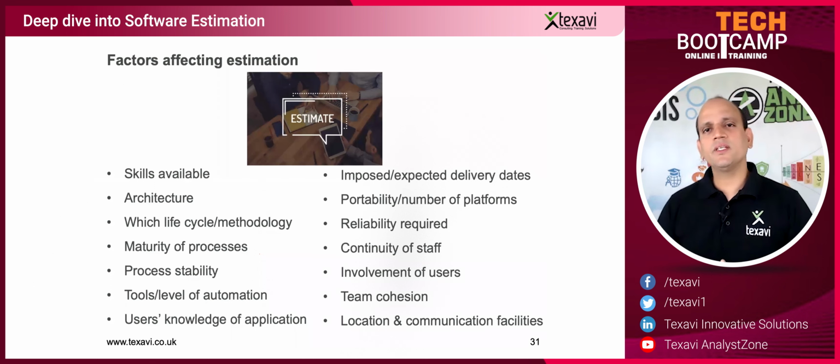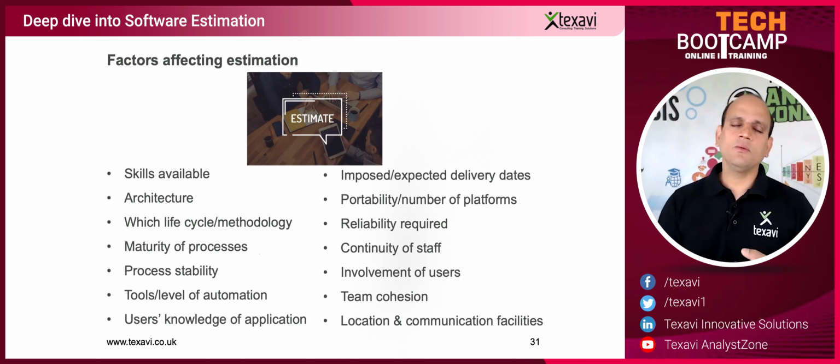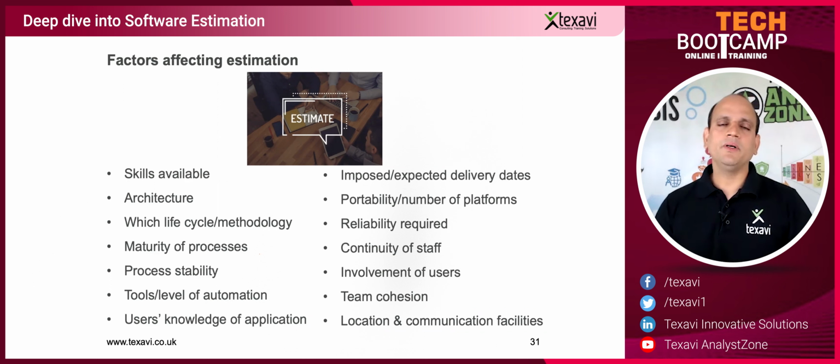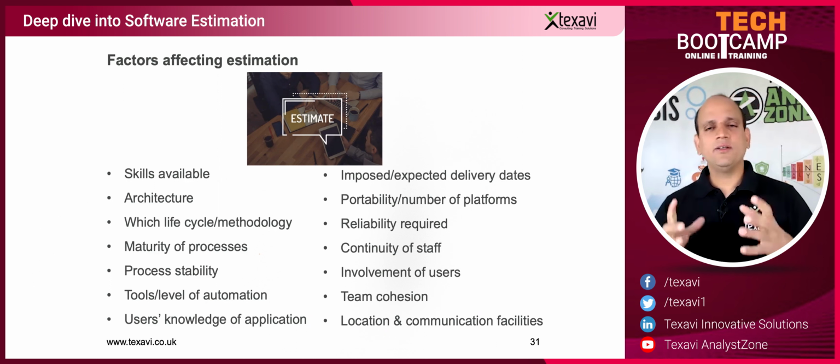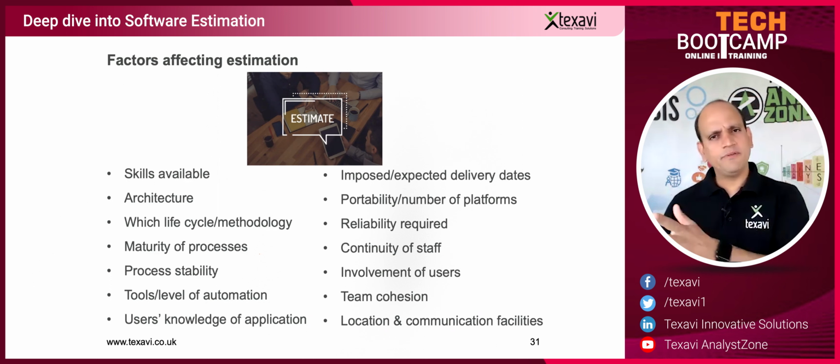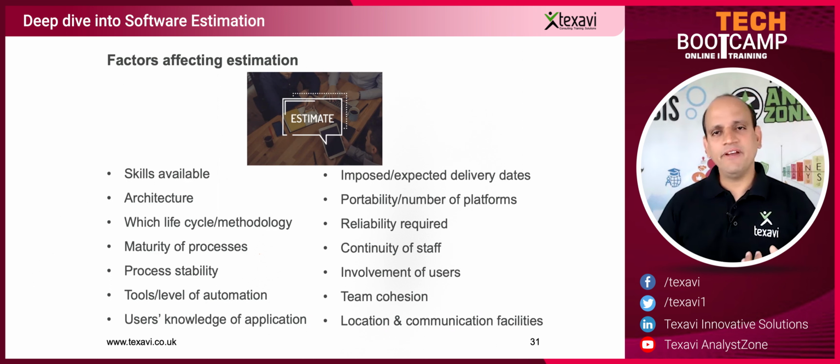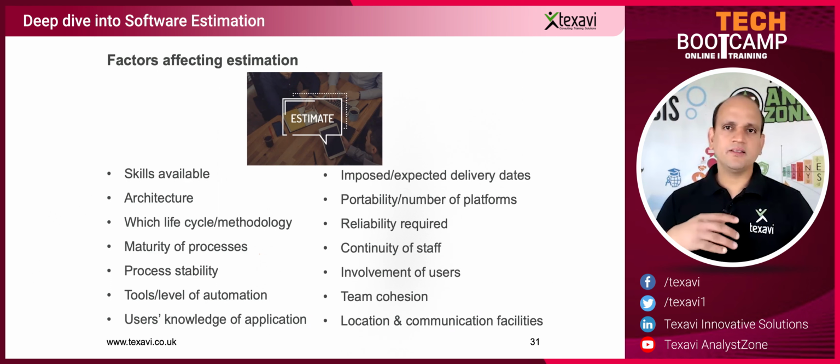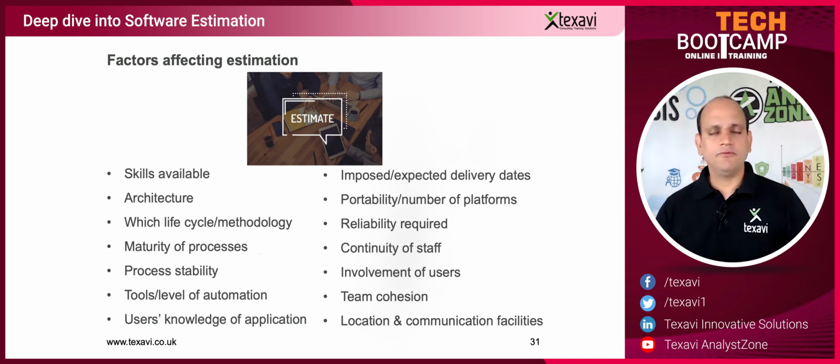Because sometimes cross-browser testing is one of the most time-taking ones in a particular development. It would be the most time-taking, most critical one for any application you're trying to develop. The most amount of time is spent not in development, not in the design, but in testing it. And in testing across so many different browsers, so many variants, so many versions, so many different platforms, different devices. Nowadays, you've got even tablets and phones and everything coming into the picture. Everything is actually being put in the fore. So you need to really be wary of all of these when you try and estimate.